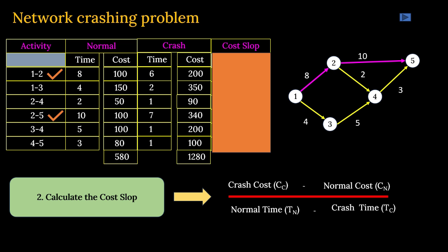Now you want to complete that activity by one day. Then you have to employ more cost over there in terms of manpower maybe, or getting better equipment with more capacity. So whatever you do, cost will be involved. So obviously your cost will be higher than your normal cost. So that's why it is higher always.